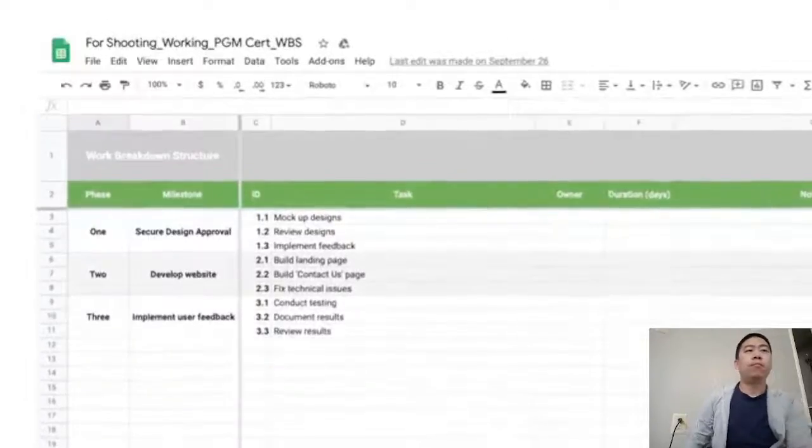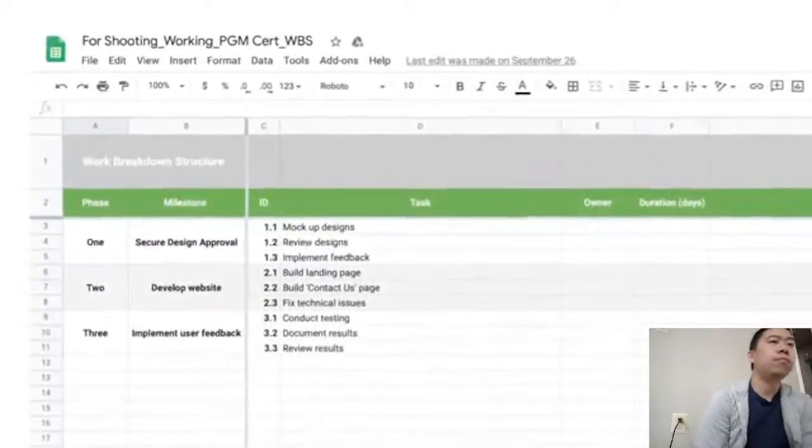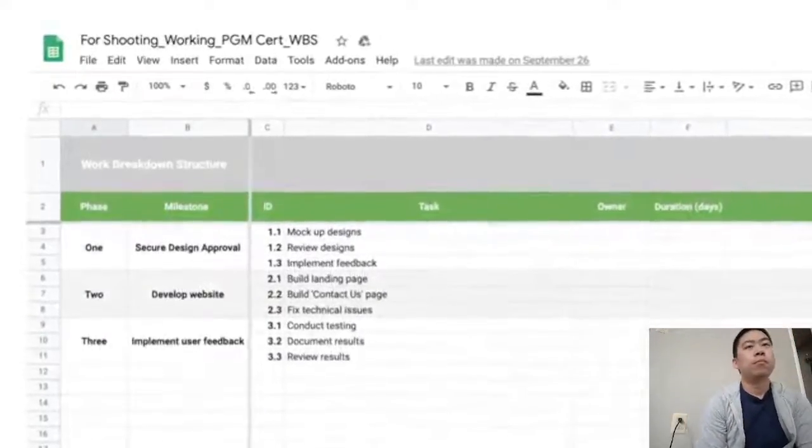It's also important to note that while creating a work breakdown structure is a helpful exercise for visualizing the tasks of a project, you wouldn't typically include this type of diagram in your official project plan. Instead, you'd input the tasks identified through this exercise into a spreadsheet or your chosen work management software, where you can more easily assign owners to each task.